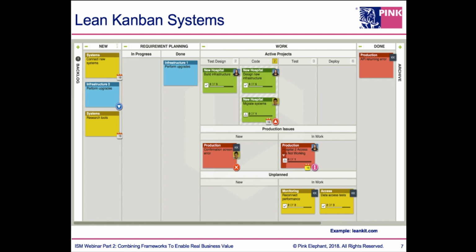The challenge we often get into, especially with classic project management, is we only focus on planned work. And this is kind of the challenge of all project managers. They have this assumption, they've been given the best intention of the people working on their project, that they have a certain percentage capacity time to work on a project. But the reality is that very few people track how much time is actually spent in non-planned work, both break fix or otherwise. And so for most people, the reality is that the majority of time that they actually spend is not on planned work, but in other areas. It's critical to make this visible. Back to the principle of Jidoka. You can't govern what you cannot see.